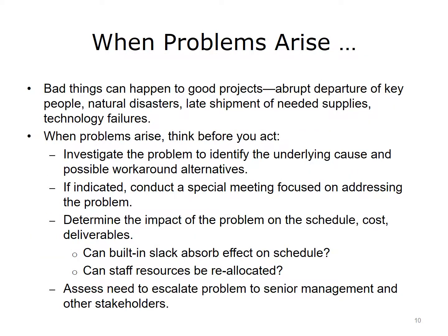When unexpected problems do arise, such as the abrupt departure of key people, natural disasters, late shipment of needed supplies, or technology failures, you must be prepared to handle them in a systematic way. First, investigate the problem to identify the underlying causes and determine possible workarounds or solutions. If indicated, bring together your project team members to discuss the problem and brainstorm fixes.